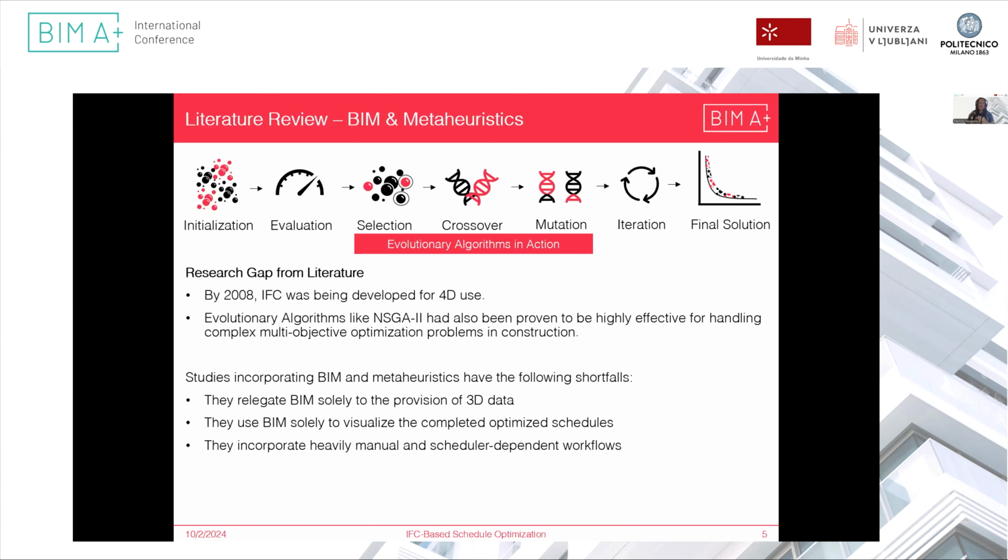For us, this would mean that they follow the successor-predecessor relationships, and they make logical sense in terms of a building. For example, you cannot start building from the 4th floor, you have to start from the foundation, and you can't start demolishing from the foundation either. So that is where the evaluation comes in. Two individuals are selected and crossed over and mutated, and their genes passed on to two new members of the next generation, which will have good genes, quote unquote.